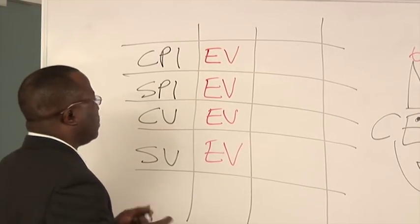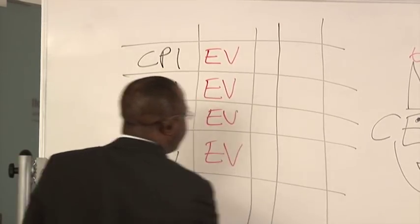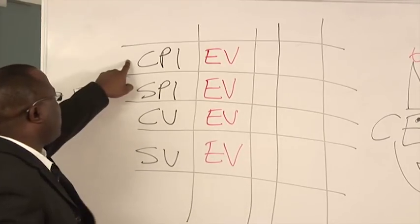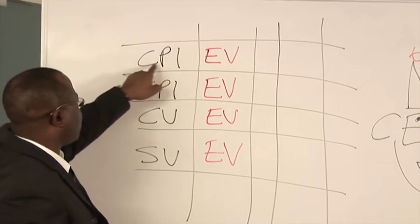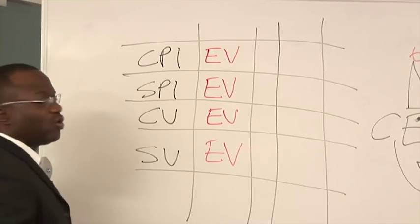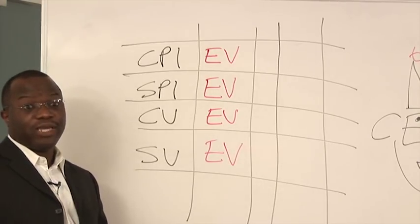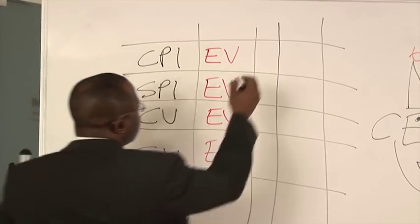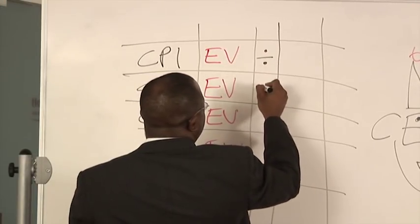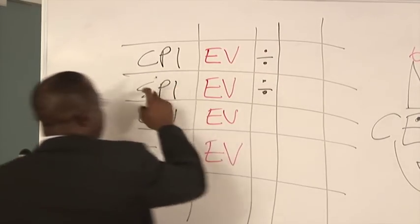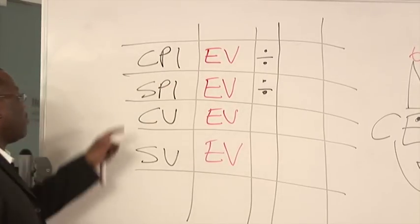You also need to remember basic math. If we're talking about an index, cost performance index, if you're talking about an index, what do we do? We divide. So we're going to put divide here and divide here. Because this is an index. Cost performance index.